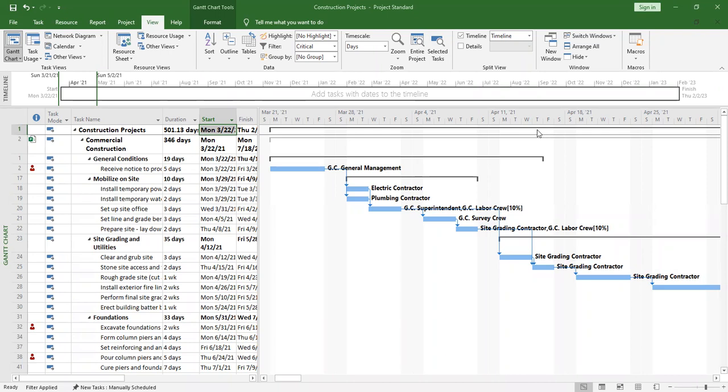So there's what they call a slack in project management. A slack is like that duration in which you can delay the activity and it doesn't delay the entire project. So for critical activities, they have a slack of 0. It means that they don't have any room for delay. If you delay them, you're going to delay the entire project.